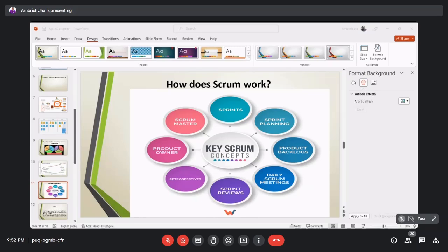This is the beauty of Agile, that every problem, before being put into the actual sprint, is groomed properly. We know the problem, and we know the solution, approximately, not the exact solution, an approximate solution. We know the effort it requires, and then we make a sprint. A sprint is a 2-week timeline.